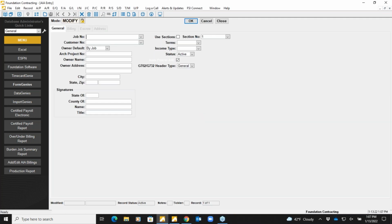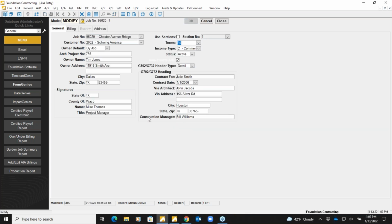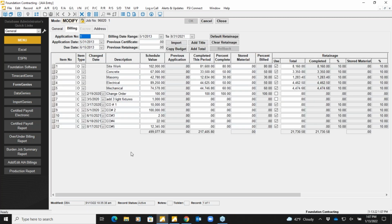Some other brief highlights about the system are being able to do AIA billings. If we have anybody that needs to produce these on a regular basis, and they're using something, once again, like QuickBooks or something that doesn't really cater toward construction and contractors, it's always a manual process, both for creating the invoice as well as getting it back into the accounting system. What we look to do is circumvent that and have one data entry screen where we can accomplish both creating our AIAs as well as updating our billings.